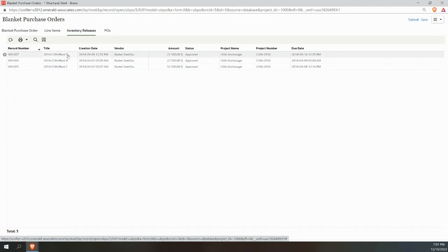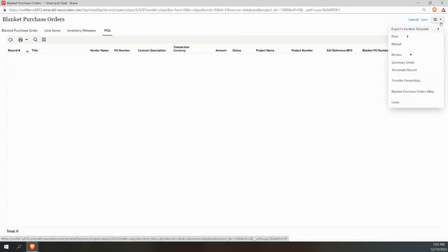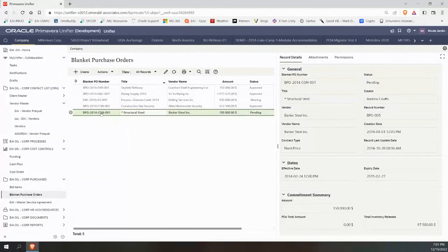But it's a push and pull, if you will, from the corporate level as well as the project level to make sure all the cost control is done properly. Okay, so these are actually executed in the project, and then I'm seeing the summary here is a better way to put it. And then there may be additional ways that we purchase against this. So although I did a blanket purchase order, I might re-up various procurement against it. Okay, so that's another key concept at the corporate level.